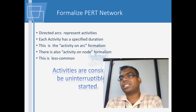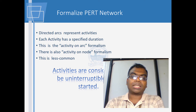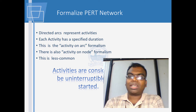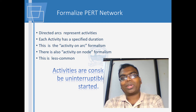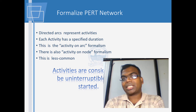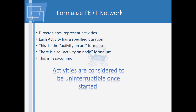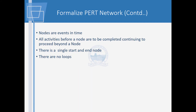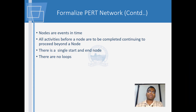We consider activities as uninterrupted once they start. However, any activity can get interrupted — due to strikes, floods, or because the owner or contractor has changed priority, finding that certain other works would be more profitable and suit cash flow. Nodes are events in time, and all activities before a node have to be completed before work can flow out of that node into the next.